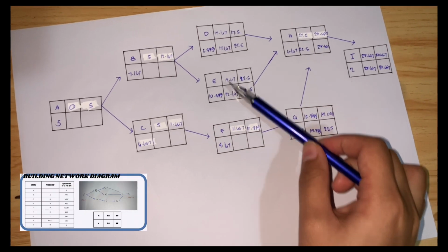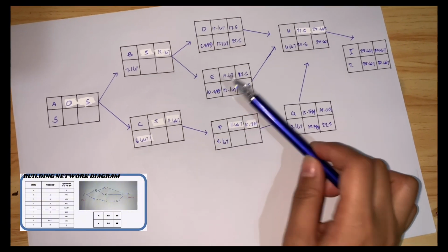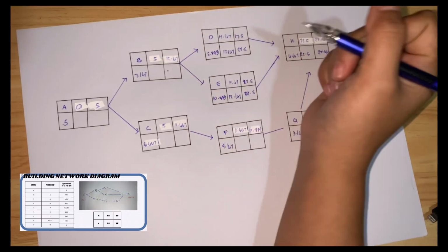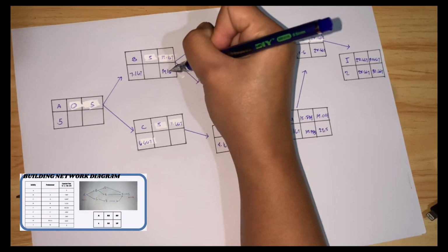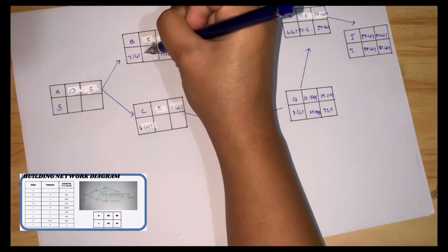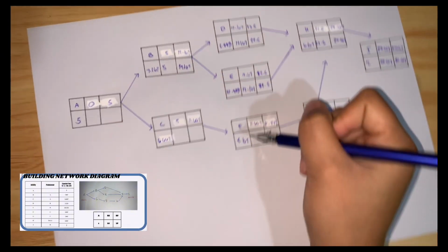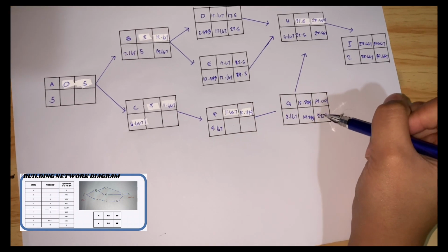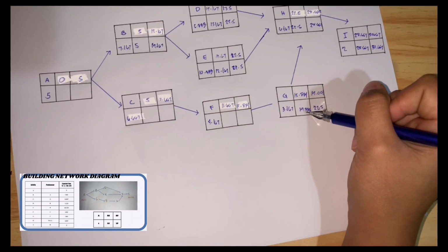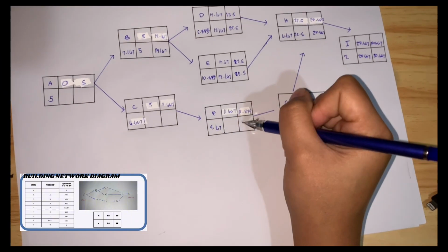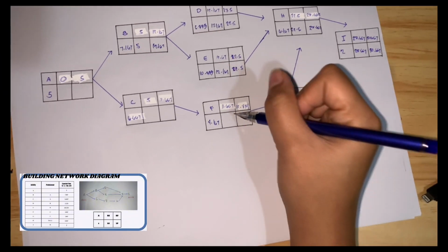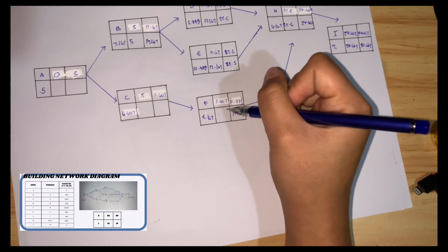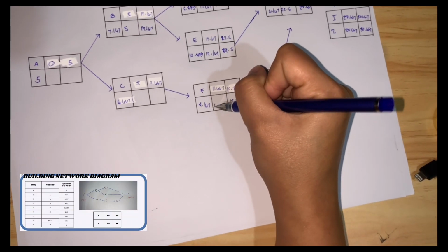And then let's do the B backward path, since B is from D to E, so we will be getting the minimum. So the minimum LS is the E, so we will use the LS of E as the LF of B, so 12.167 minus the expected time of B is equal to 5. And then the F, since this is from G, G has LS of 19.33, so the LF of F is 19.333 minus the expected time of F, so it will be